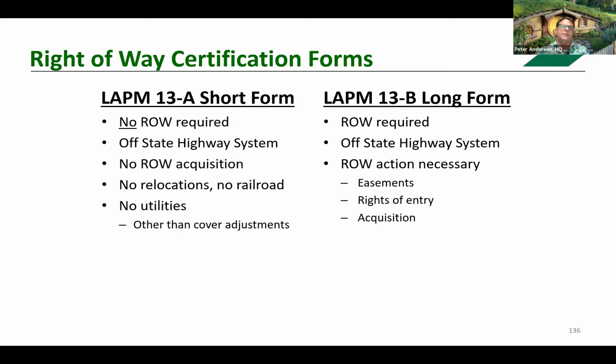So yes, one thing that's very important on the environmental is that the environmental document has, and same with the right-of-way, sir, has to cover the entire project. I mentioned this morning about the FTIP, it says one thing. You can do work outside the FTIP limits. It's just non-participating. You cannot do that for either the right-of-way cert or the environmental document. It must cover the entire scope of the work.